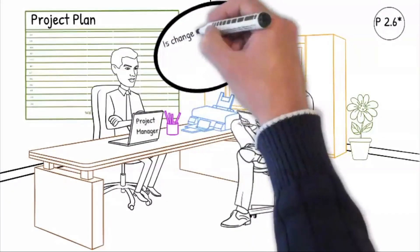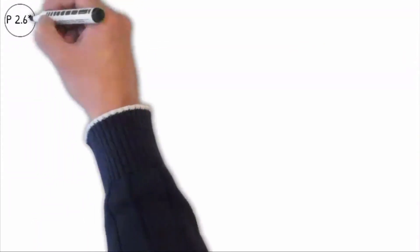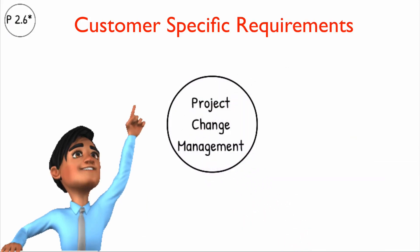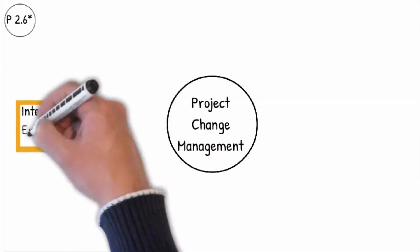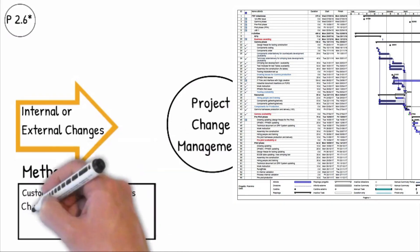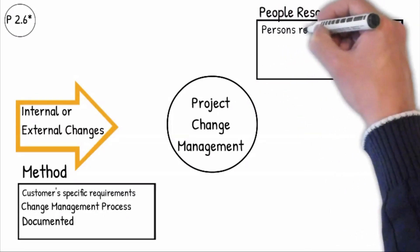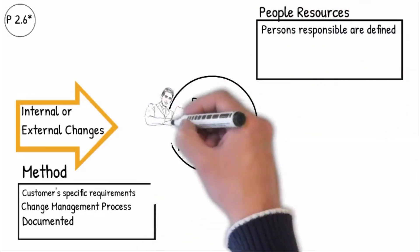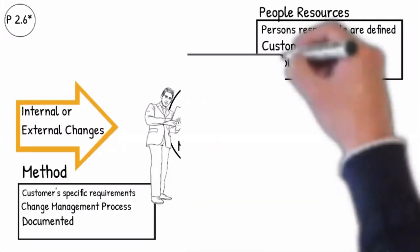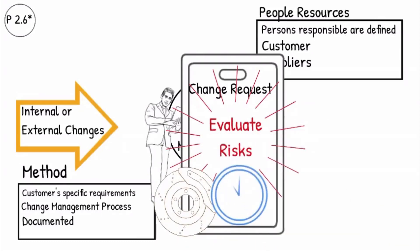Question P2.6: Is change management within the project ensured by the project organization? Change management within the project meets the customer-specific requirements. All changes — initiated internally, by the supplier, or by the customer — must be evaluated, and if necessary the project plan must be adapted and documented according to customer requirements. The persons responsible for change management are defined for the customer, internally and to suppliers. All changes must be evaluated and must include the risk assessment for the product quality as well as ensuring that deadlines will be achieved.